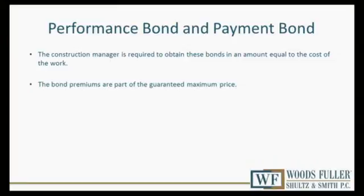I think, from my experience, the benefit of the construction manager at risk process is that you have all of these stopping points where you keep checking the potential costs. And I can't imagine that the construction manager would go out and not verify to a pretty significant extent what those costs are going to be at each juncture, so that, I mean, they're in it to make money, not to end up in a situation where they've got to dig into their own pockets. The only concern I have is that if that does happen, that we don't get stuck putting in the extra $2 or $3 million or whatever it would be, and have to go out and get a new contractor to do that. Now, Randy, I'm sure that's not going to happen.